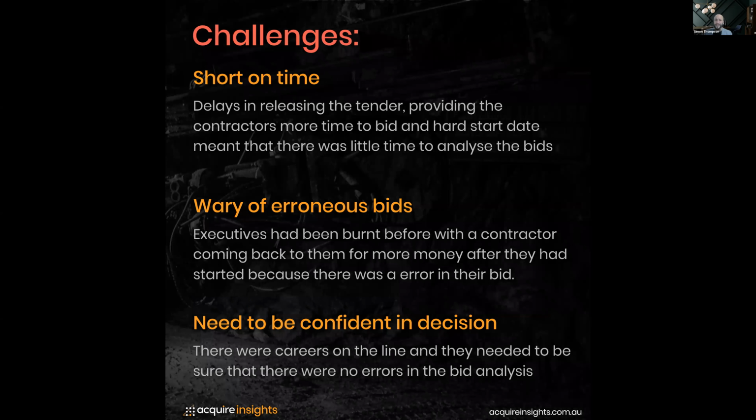So with all those three things came a couple of challenges. The first challenge was that they were short on time. They had some delays in actually releasing the tender. They needed to provide the contractors a little bit more time to bid, but they had a really hard start date, which meant that everything was compressed and they had very little time to actually do the bid analysis.